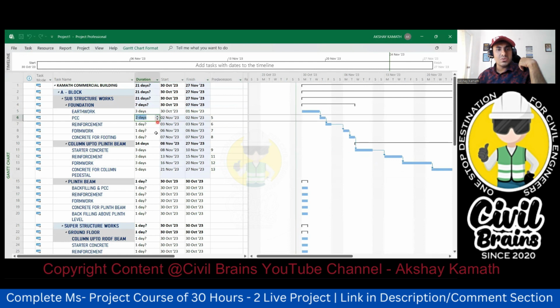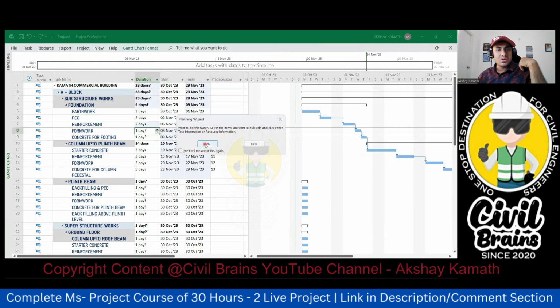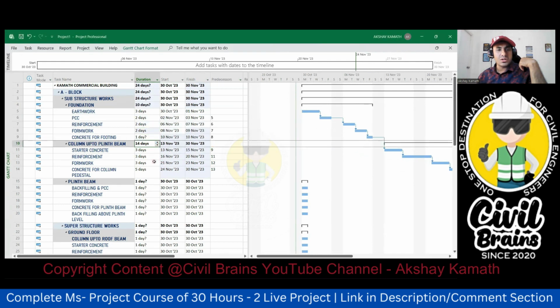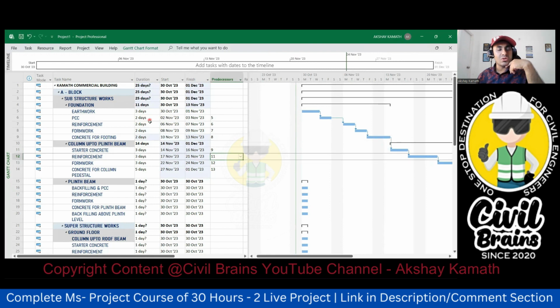So you can even increase the duration also. Try to increase, give certain durations. Any duration is fine. Okay, say okay, whatever error let it come, give the durations and all. Yeah. Starter concrete, earthwork. Earthwork will start. Yeah. That's it. See, whenever you get this question mark, that means here I haven't given how many days. So I'll increase this to 2 days. Now it will be fine. This error is gone.